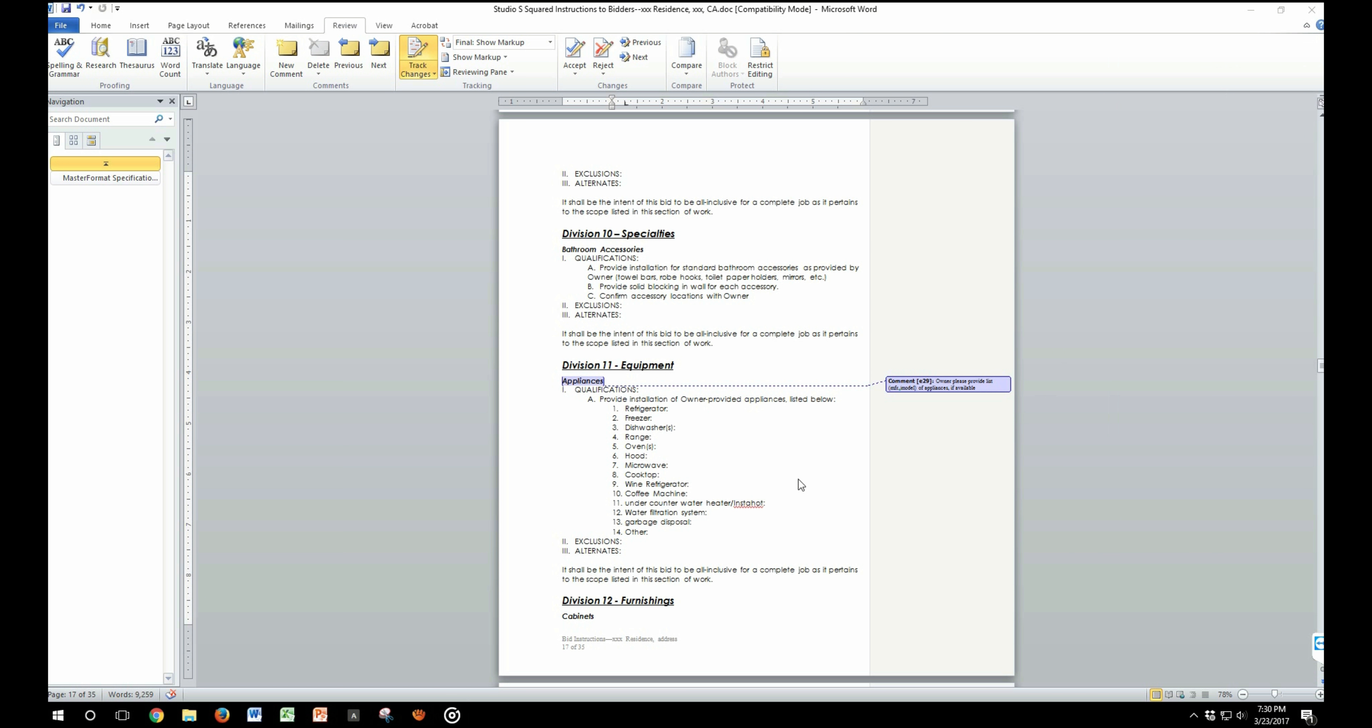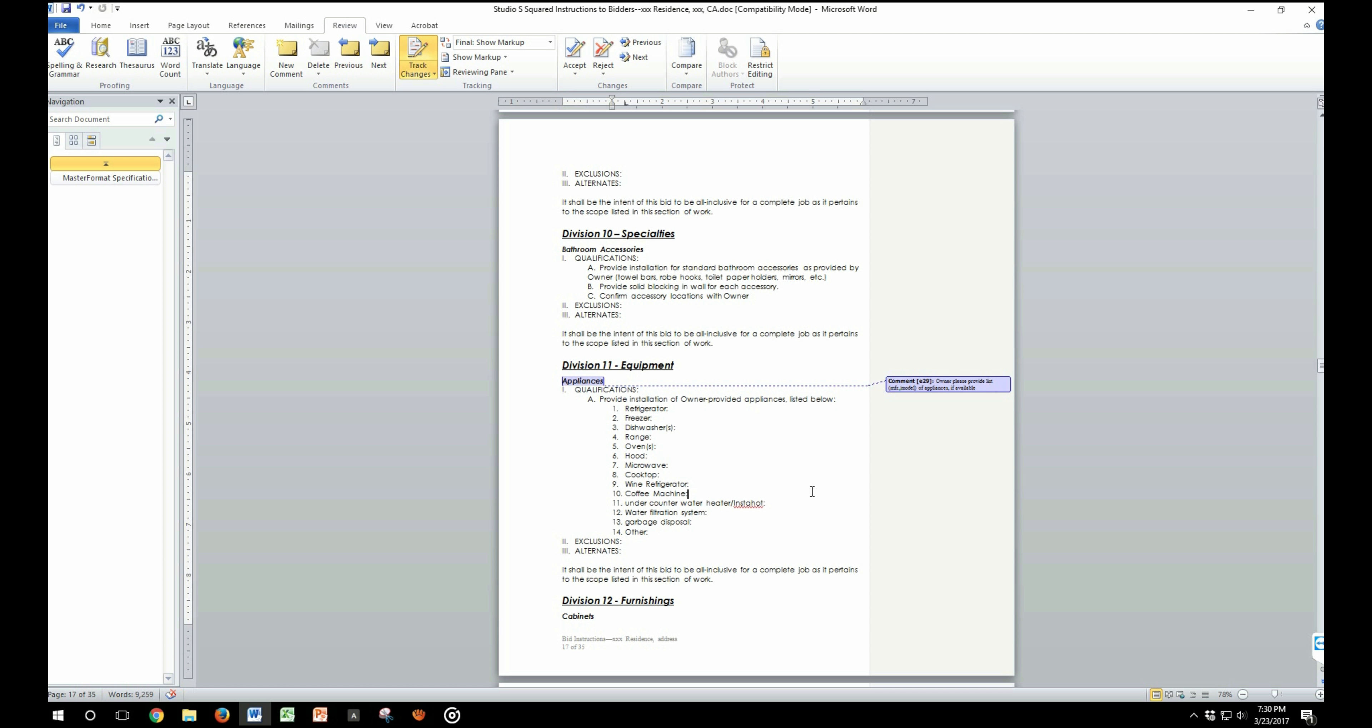Let's also look at Division 11. This section requires you to input the list of appliances that will need to get installed on site. Providing a complete list of all the appliances will aid the contractor to come back with a more accurate bid for your project.